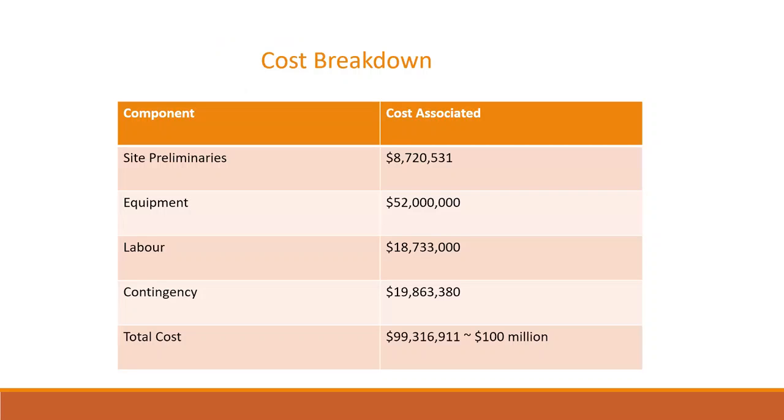Thanks, Liam. I'll be talking about the costs associated with this project. The site remediation for this project includes activities such as environmental impact assessment, choosing appropriate remediation technique, labor, etc. The costing estimate uses the data from the Cordell Commercial Building Cost Guide 2020, and therefore assumptions have been made with respect to the number of personnel required.